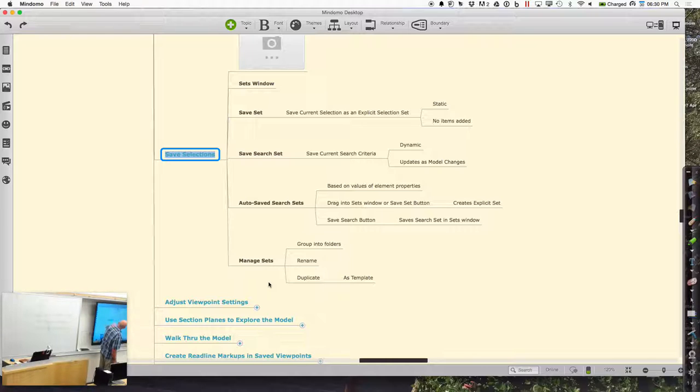But that is kind of just create those because that's really useful for you in terms of being able to grab things really quickly. So like what you guys are doing in the meeting, there's 800,000 elements, but what you really want is to find all the ones that have a clash problem, that's a spatial relationship, or all the ones that have a clash that belong to vendor X, or that are from a specific trade, or that are due to be installed in the next 2 weeks, so that you don't have to deal with hundreds of thousands of things all at once. So selections really are probably the most powerful thing you can do to play with this. So that'll get you going in terms of the big power there.